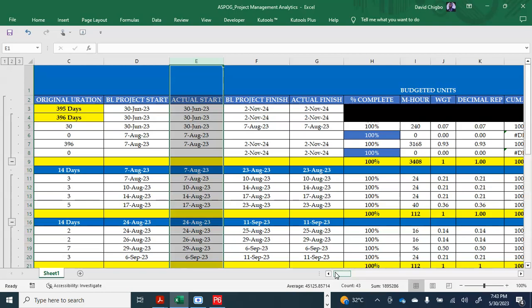It's not acceptable. Your baseline is your roadmap. You cannot start before your baseline. You have to start within or after your baseline, as you created the schedule, not before that baseline. Except if you've started, then you take note of it. When you create your schedule, you push the date back to the actual time you started. This is a baseline, a copy of your plan, but you cannot finish the project before it.